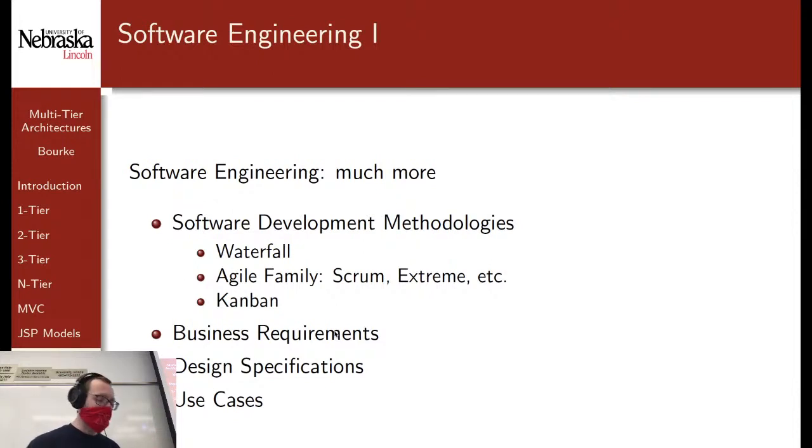That's basically Agile, and Agile is intended to be a self-managed system where you've got software teams that decide what they're going to be doing for the next 4 weeks, commit to it, track their progress, and at the end they manage themselves and each other by saying, you haven't done any tasks according to our burn down chart.